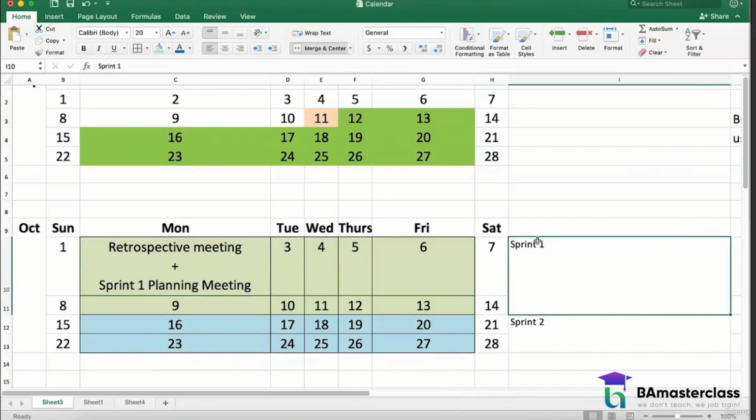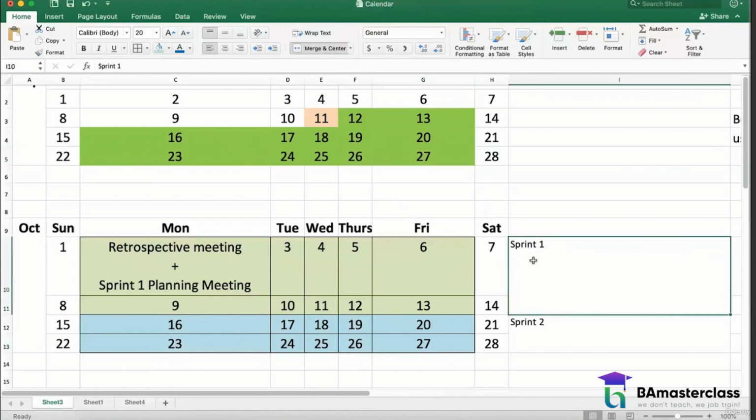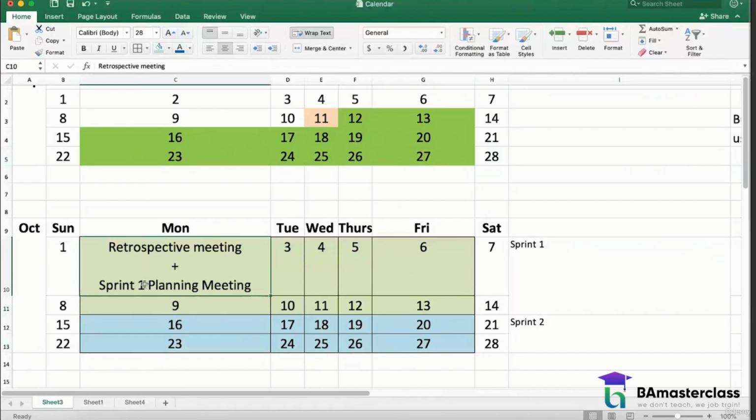So if I'm doing the planning for sprint 1, I want to identify what we are delivering. What are the goals of sprint 1? What am I delivering in this sprint, in this cycle? How many stories do I need to deliver on the 28th? I need to deliver 15 stories that I already have created. Out of these 15 stories, in my sprint 1, I'm going to take 8 highest priority stories. And in this planning meeting I have the Scrum Master and the development team with me. So I conduct a planning meeting with the Scrum Master and the development team.